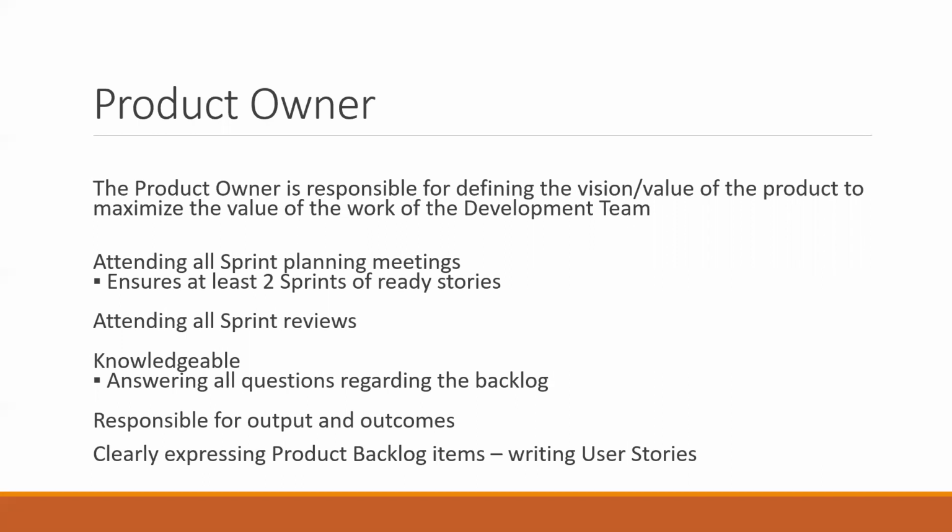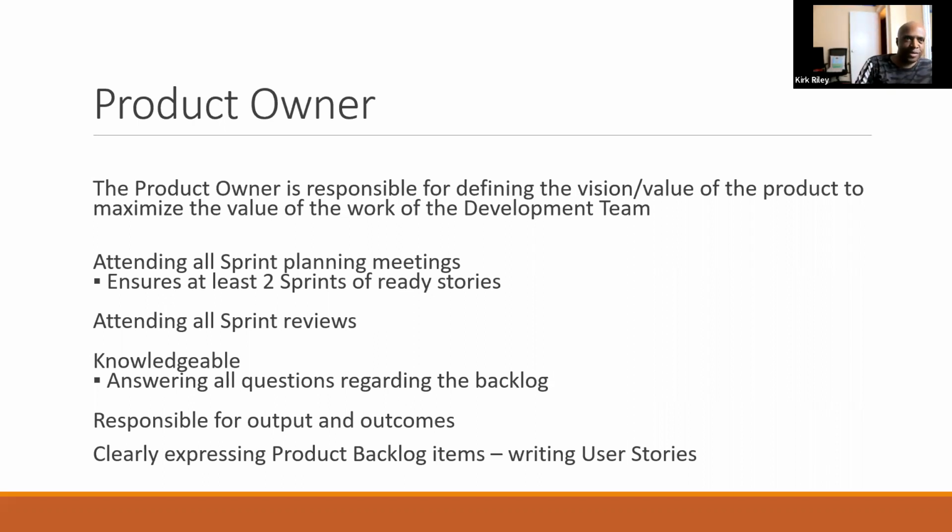So to avoid or limit that, just like what Keck said, sometimes it's something that is really of top priority. There's nothing we can do, and it has to be worked on. You can do what we call trade-offs, just to limit your velocity or your metrics from being affected at the end of the sprint. You can do a trade-off per the story points that you had initially estimated for the story that you're pulling out and the story that you're swapping in to bring into that sprint. I don't know if that makes sense, but I just thought I should chip in. Yes. You said it well, Lois.